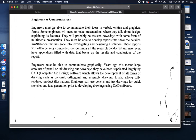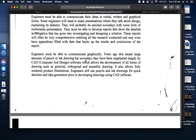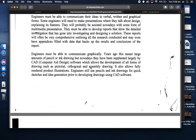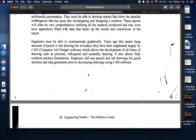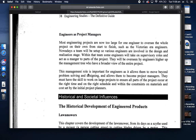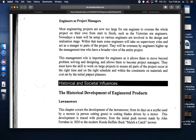On that project, communication was a really important part. Freehand sketches were how I communicated with other stakeholders. My work wouldn't let me do CAD - engineers were too expensive to spend time on CAD, so we hand drew things and handed them to drafters who would redraw them. Communication with drafters used a color-coded system: we highlighted changes in yellow, drafters marked completed changes in green, and when we were happy we crossed them out in red.